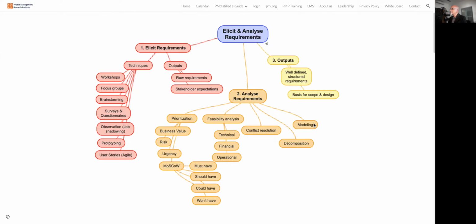So when we create a model and demonstrate to the client, they'll be able to give additional requirements, or they'll be able to come out with problems much earlier. And especially with building information modeling, that will result in better risk management upfront because we can do things like clash detection, etc., so that we get very refined requirements if you can do modeling.